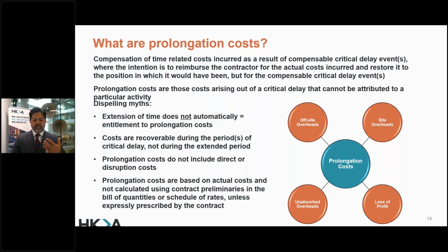In a construction and civil engineering project, we often make the mistake of believing that time and money are directly linked. They're not. We assume that a financial claim recovery can only be secured if an extension of time has been granted, and conversely, that it will certainly be due if an extension of time has been given. No. A contractor may receive a comprehensive extension of time and still not be entitled to additional financial recovery. So how do we do this financial recovery?